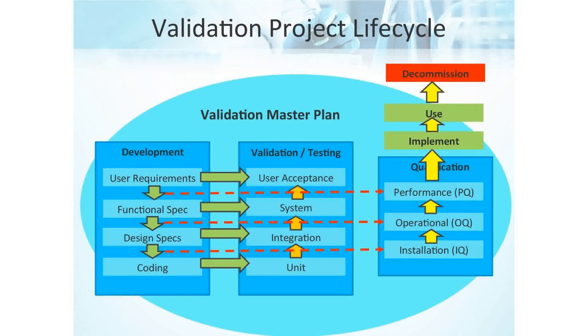And then moving up, you've got the design specs. Well, it relates to integration and the OQ. And mention the OQ, and the purpose of the OQ is to prove that what was requested as functionality is working as intended. This requires OQ test scripts, again, formal documents that are approved by the quality organization and then executed. And then you need to review the execution to make sure that everything was done correctly as well.